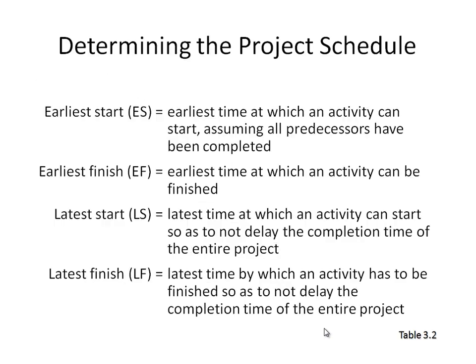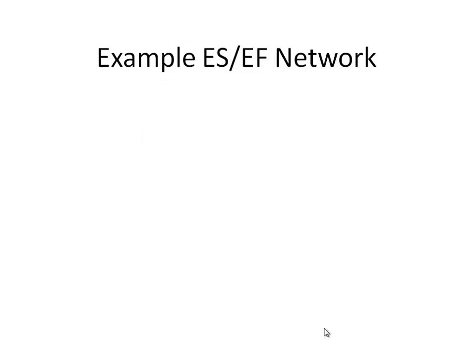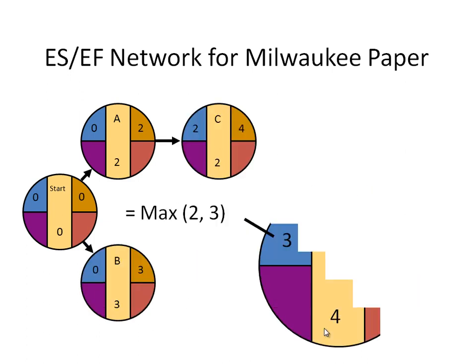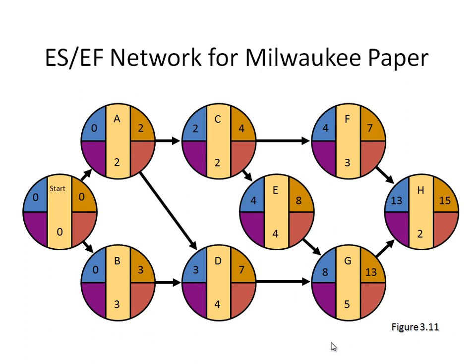While if you go to the network diagram that we just built, you can see that it will end in 15 days. So it's not by adding the weeks or the duration for each activity as is, it's by the sequence of activities and whether some of them can be done in parallel or not.